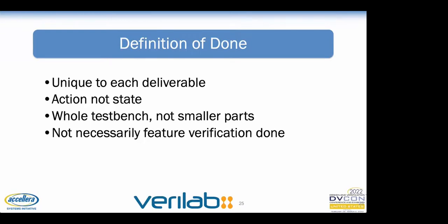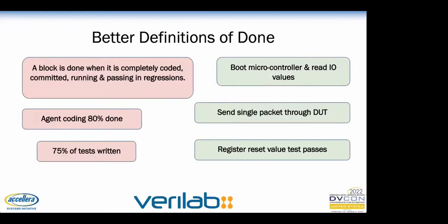While there's nothing wrong with that, often a smaller or partial deliverable can be just as useful. We may want to limit some of the degrees of freedom or features that we're verifying to make the deliverable smaller. In that case, the definition of done for the deliverable isn't that the feature is completely verified, but that some aspects enumerated in the definition of done have been verified.